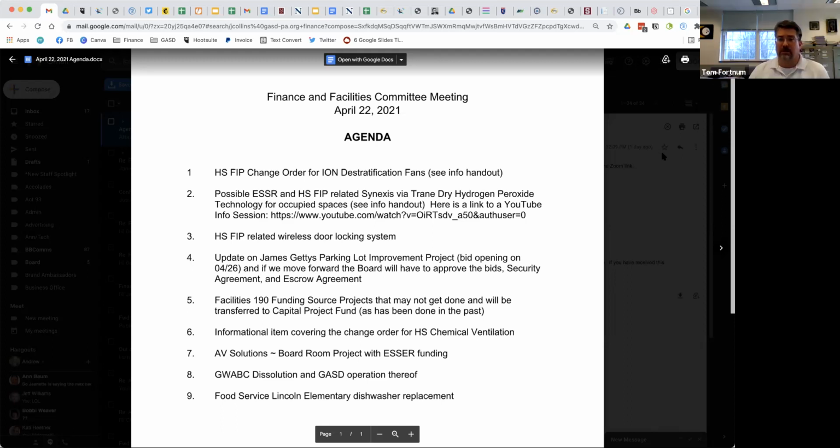Yeah, I'm sure that would be possible. Thank you. And with the change orders, we try to make it a little bit more reasonable too. You'll see later on, there's a cost cutoff where I can approve a change order versus the board approving a change order. The last project that I went through personally, we were looking at 40 to 45 change orders per board meeting.